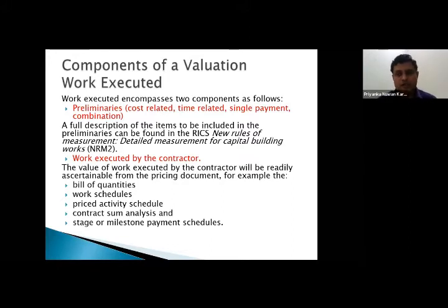That is like giving a subdivision, an apportionment of the elements of work by dividing the contract sum. Contract sum is also a term which is not coming from FIDIC, it is coming from UK based contracts. Here we are talking about accepted contract amount. Now you must be wondering whether Oman conditions of contract has got something like that. No, Oman conditions of contract has got something called contract value, right? This accepted contract amount is a terminology which has been introduced from FIDIC 1999 onwards.